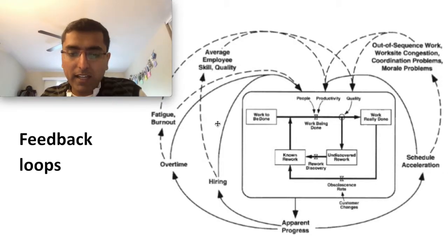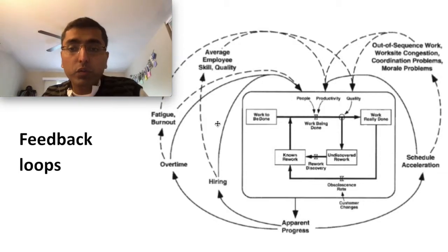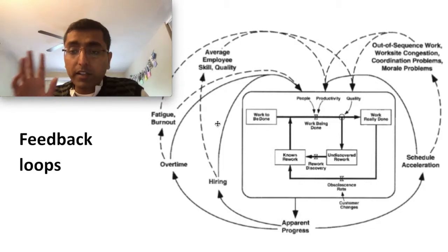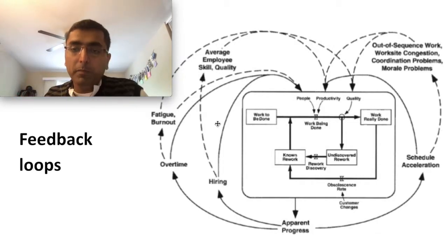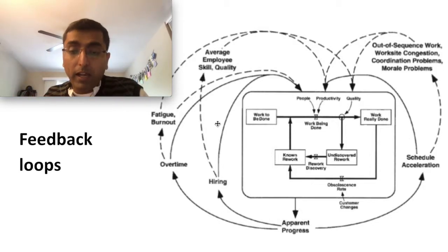This model was able to articulate the cost of indirect impact on the project in money terms. And when that happened, it was able to prove in court that there was a huge change in contract that was needed for the money to be paid, and also the timeline. This is another case study which I think we can use for modeling, as there is a significant impact of direct rework and indirect impacts on people, morale, skill sets, hiring, and acceleration issues on your system. So be very mindful of this agility part and use it very carefully, only when you absolutely have to. That was case study number 2.